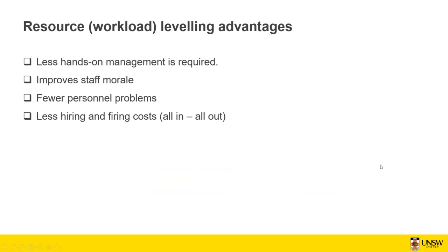So what are the advantages? The advantage is that there is going to be less hands-on management required, because if you've got a very short amount of time with a lot of workload and a lot of people working on a task at the same time, there's going to be a lot of miscommunication and pressure on the staff, etc., and also on the management. So you want to avoid that.